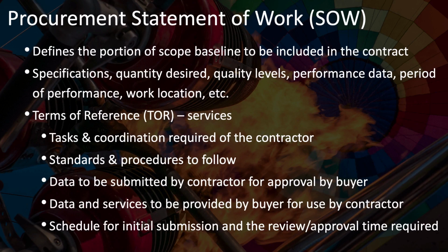It's quite common for us to assume that web pages or screens will load in a reasonable amount of time, and for us to not specifically define how long is too long. When working with internal people or vendors with which you have a good established relationship, that's usually okay, but it's not okay when working with new people in new organizations. You have to be more specific.